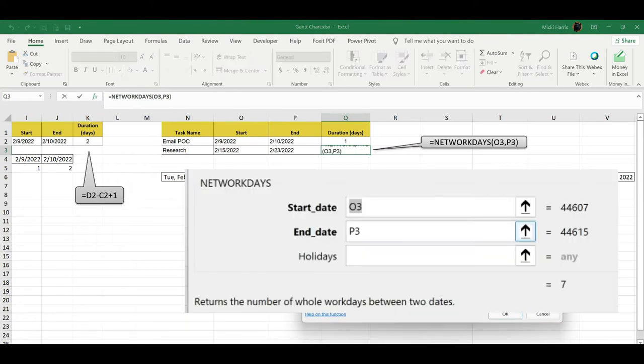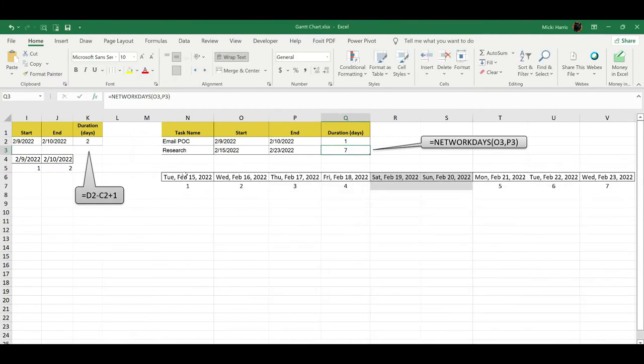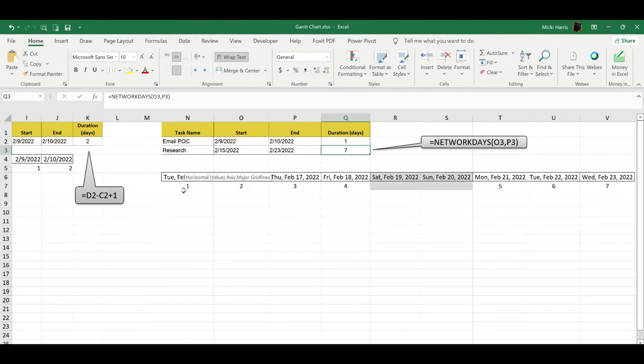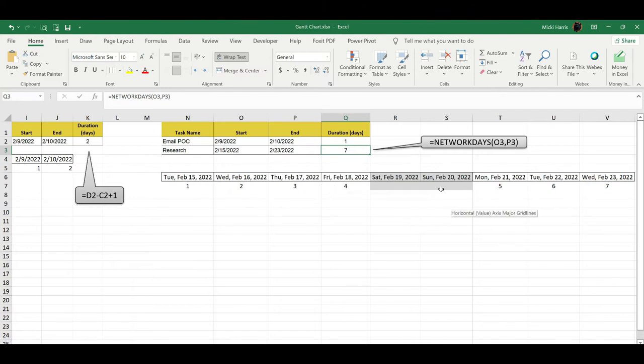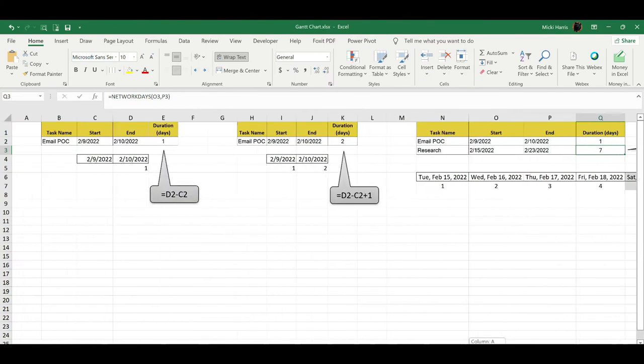So I enter a start date and I enter the end date, and then that tells me how many days. And as you can see here how I mapped it out, so I'm seeing that my start date, we're looking at this one right here for seven days, it's counting that first day, and it's going Tuesday through Friday, but it is skipping Saturday and Sunday, and then it's continuing on. So again, you have three options: your network days function or a couple of simple formulas.